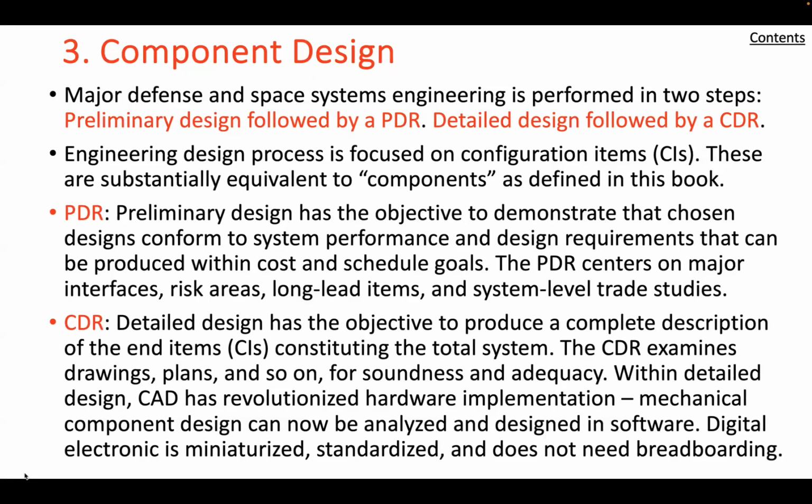In the development of major defense and space systems, the engineering design effort is performed in 2 steps, designated preliminary design and detailed design. So we're seeing the PDR and CDR here in this chart in red. That's what we're referring to.